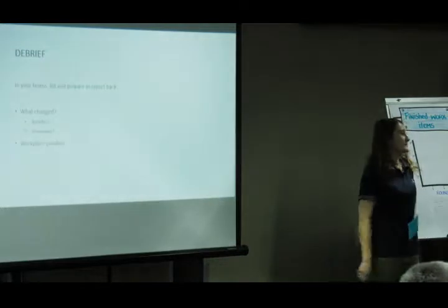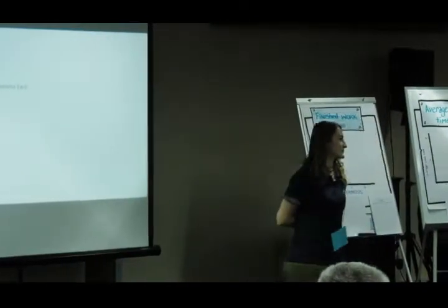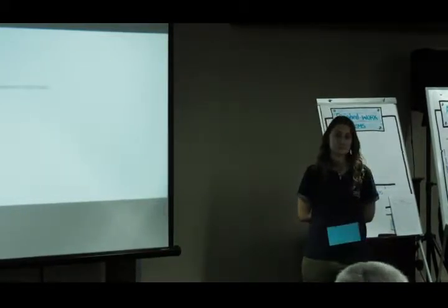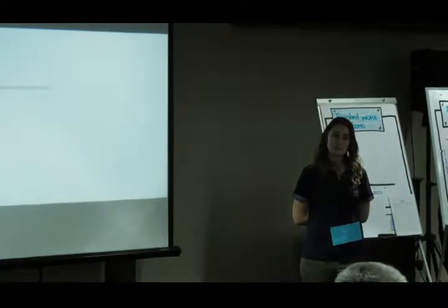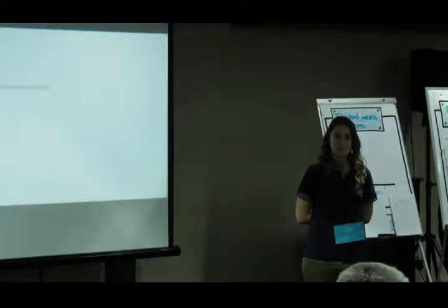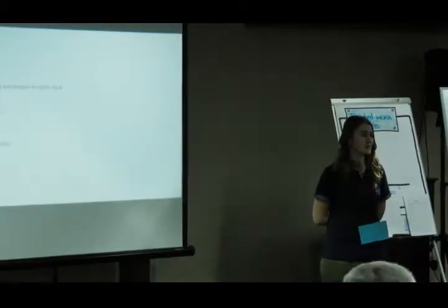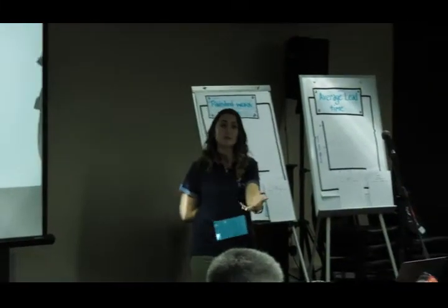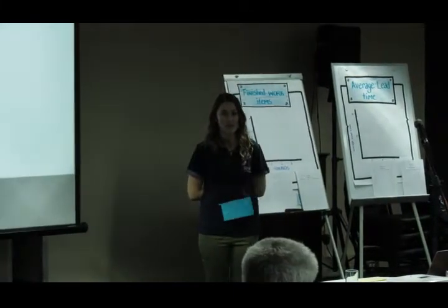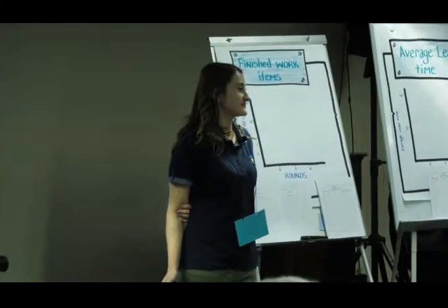Okay, great. So, quick debrief. How was round 3? Much better. I heard much better. Anything else? So the burn rate. The waste was way less. Did everyone else notice that the waste was less? That's an effect of what would happen if you limit your work in progress, right? Any workplace parallels from this round?